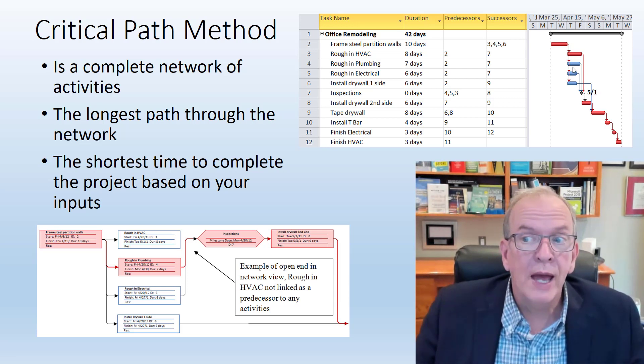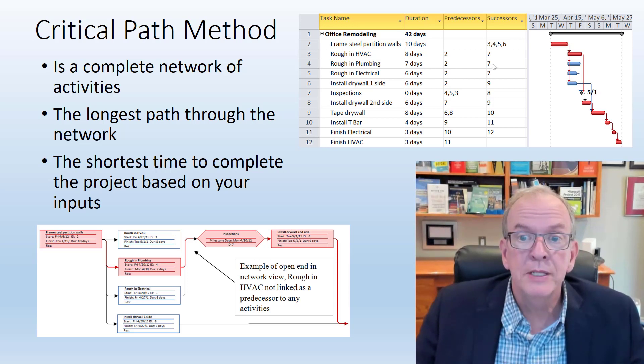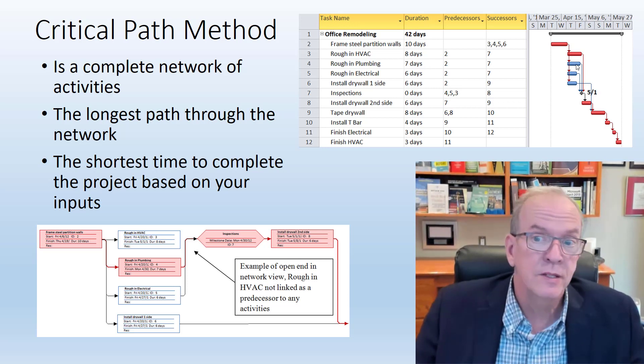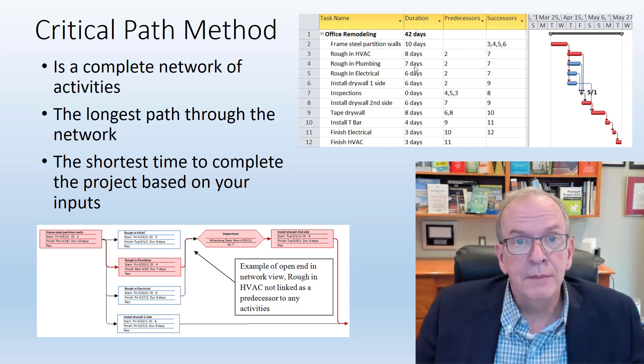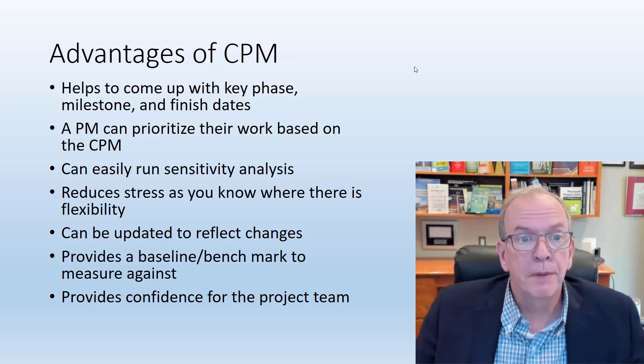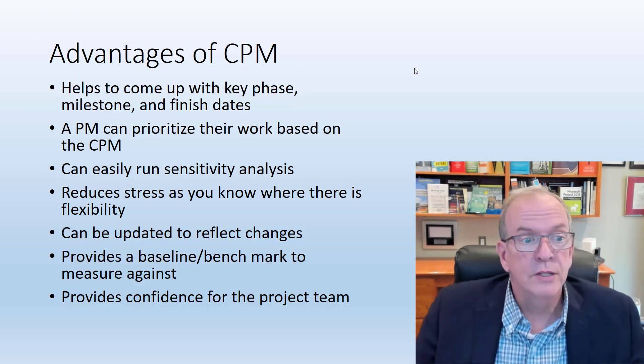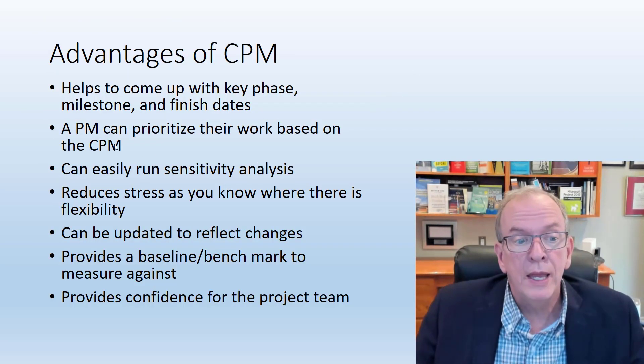However, if my HVAC sub came up to me and said it's going to take three days longer, I know my project is going to take three days longer. I can prioritize based on the critical path. I can also look at, well, this is pretty close. So if my plumbing sub comes and says it's going to take three days longer, I know that it's going to delay my project by another two days. So it gives me good information that way.